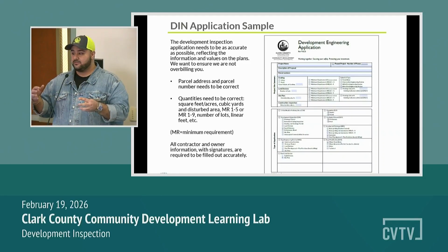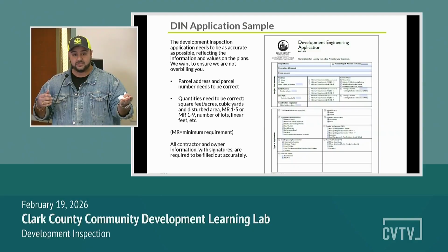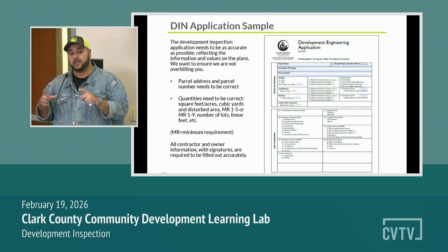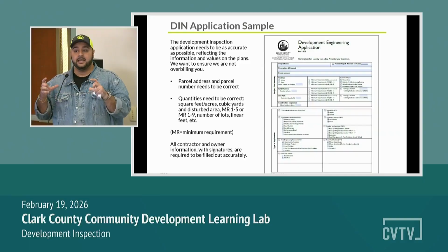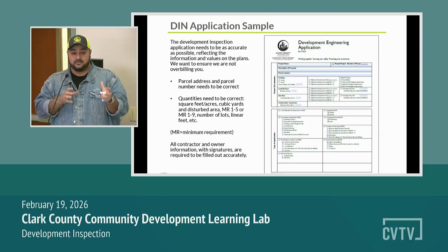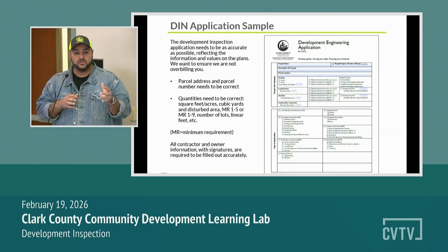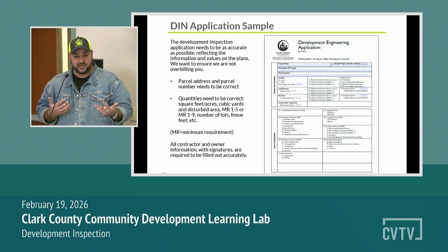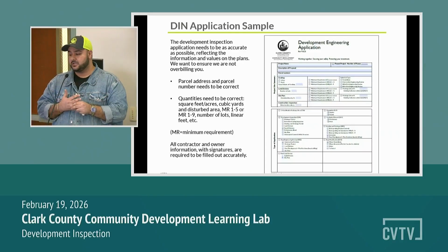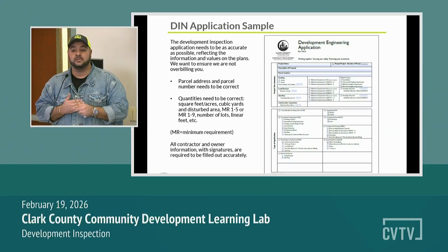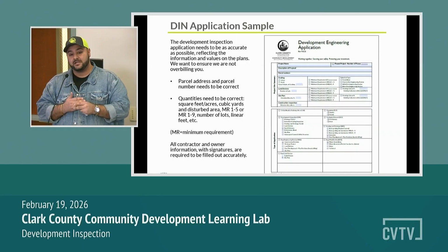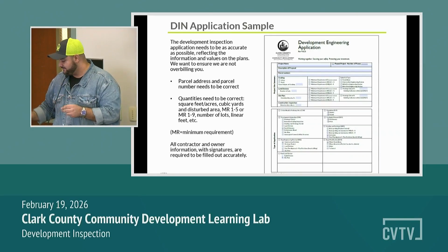So a lot of this stuff for us, we base off of what the application is being submitted, what your engineering plans were approved. There is a quantities block on there that we actually evaluate and take a look at. And that really is controlling what your bill is going to be. So for your best interest, we want to make sure everything is absolutely cohesive, it's comprehensive, and we have everything as accurately as possible so we don't overbill you, because our fees on the development inspection case are collected up front, and you don't want to overpay. And of course, a refund is never fun.